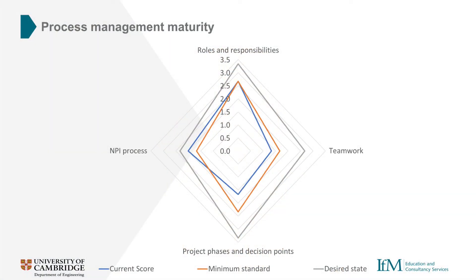Let's take a look at both our process and portfolio management maturity in detail. Turning first to process management, we can see that we have a couple of areas where current scores are below the minimum we need. We seem to have a problem with both teamwork and project phases and decision points. It's likely that there's a lack of common understanding around the nature and purpose of gated review sessions, which has no doubt been made worse by the fact that our teams are not working well together. We need to think about how we can support communication and teamwork and take actions that are going to get everyone on the same page.